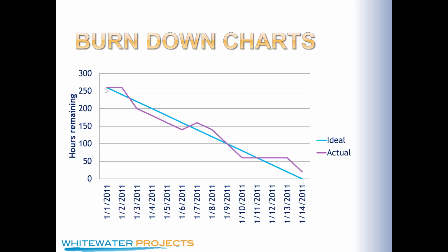So stop pretending. You look at it and you estimate, okay, this is an 8-hour story. At the end of the first day, you worked on it for 5 hours, right? You were coding away and pounding away. And at the end of that 5 hours, you went, oh, crap. This is more complicated than I thought. I probably still have 8 hours left on this, even though I worked on it hard all day.